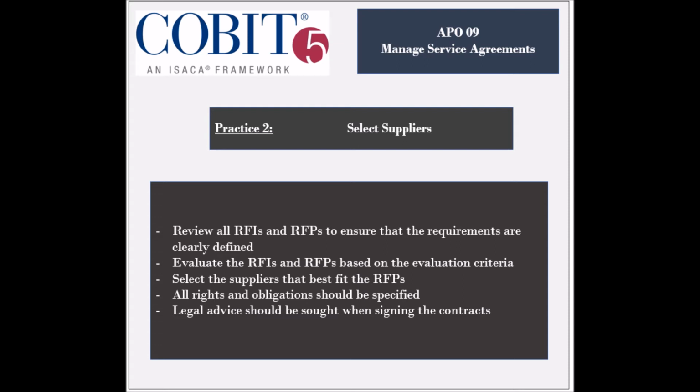The rights and obligations of all parties should be specified in the contracts, such as the licensing of intellectual property, the service levels, maintenance, warranties, performance criteria, payment methods, and compliance with the organization's policies. Finally, legal advice should be sought when signing the contract.